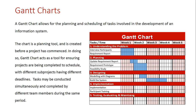The implementation stage will involve us actually implementing the information system into the workplace and then training the participants. These can overlap each other because we are installing it into the workplace where the participants are, and we can be showing them how it works, trialing it on a few machines.